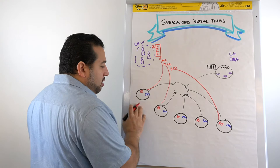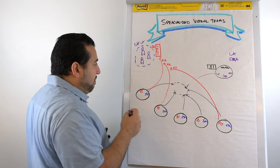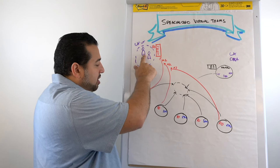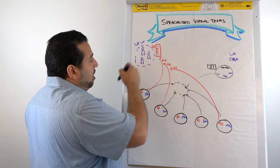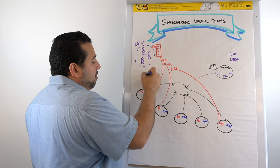Then what happens is every single sprint, let's say we're in sprint five, this product owner is going to almost like deploy this UX person as a guest team member to those teams, based on the request. So I might say, we'll name these A, B and C. UX person A, you're going to go over to team one, and you're going to go there for all of sprint five.